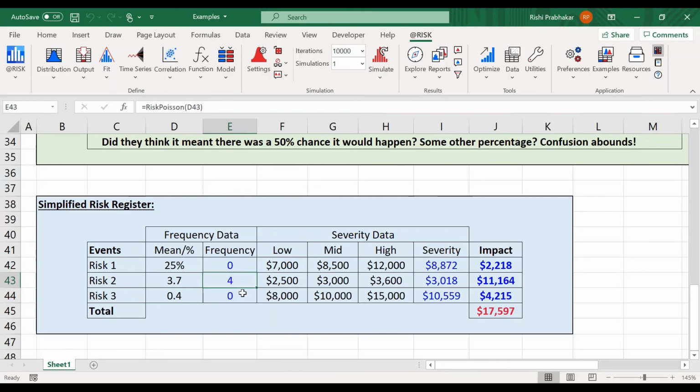So I could have, for example, this risk, instead of just being a 0, it could be: if this equals 1, because that's a yes/no, then this is going to be a Poisson distribution, but not just the regular one, it's going to be at least 1.